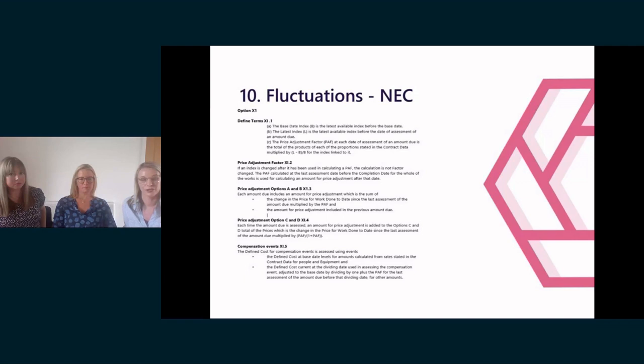And then, of course, when you come to engage with your supply chain, you find that that PI cover is just not available, and certainly not available to them at a commercially reasonable price. So again, it really comes down to understanding what's in your contract and making sure that those obligations aren't absolute and that there is some wriggle room for you to go back to the employer, and equally for the employer to go back to the funder to say, it's not available on that basis.